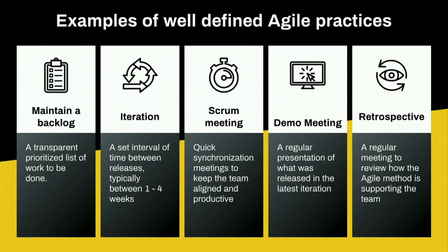And building releases and working in blocks, time-boxed blocks. Having things like Scrum meetings, daily stand-ups, synchronization meetings, quick 15-minute meetings to keep everybody on the same page. You could do this every day or maybe a couple times a week. Things like a demo meeting. At the demo, you're showing off the work that you produced at the end of each iteration. So every 2 weeks, you're sharing with your broader team, here's the stuff that we launched, here's the stuff we worked on, so they're aware of it.